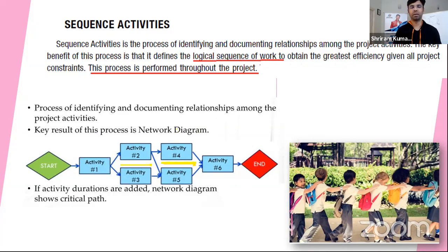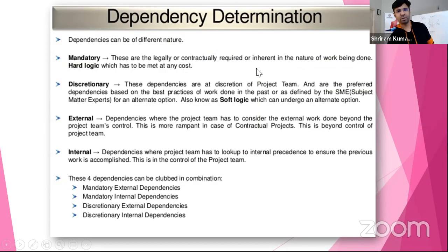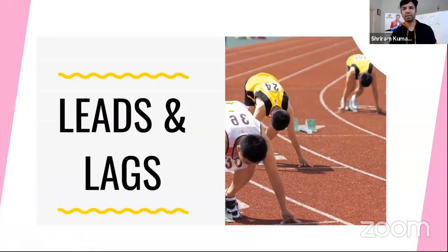Those are the factors which decide your project's movement, right? So sequencing activities, which is called logical sequencing, sets your project on track. When I say track, I was talking about these dependencies. I'm sure some of you read about it when reading books for the examination. You would have seen mandatory, discretionary, internal, and external dependencies. Most of the time, dependencies decide your movement. Am I going in the right direction or not? Dependency will tell you. Dependency sometimes delays, sometimes moves things forward. So how well you handle the dependency is your management. A dependency can even be third party. Imagine you have a dependency on a vendor. You cannot straight away say, okay, I will do it. It will depend on the vendor's delivery timeline, which can impact your project.